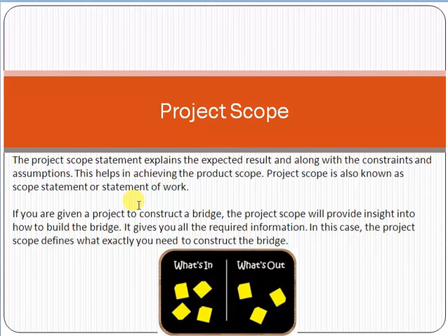First of all, when the scoping is done, we have a clear understanding of what needs to be done, what is required. And at a later stage, if the customer says that we need one more module, one more requirement, we can say that it's a change request, because at an earlier stage you didn't tell us that it's a requirement. As per the signed scope document for the project, we have to deliver 10 requirements. If you ask for one more requirement, we will consider it a change request, a new requirement, because this requirement is not mentioned in the signed scope document. So are you following me?